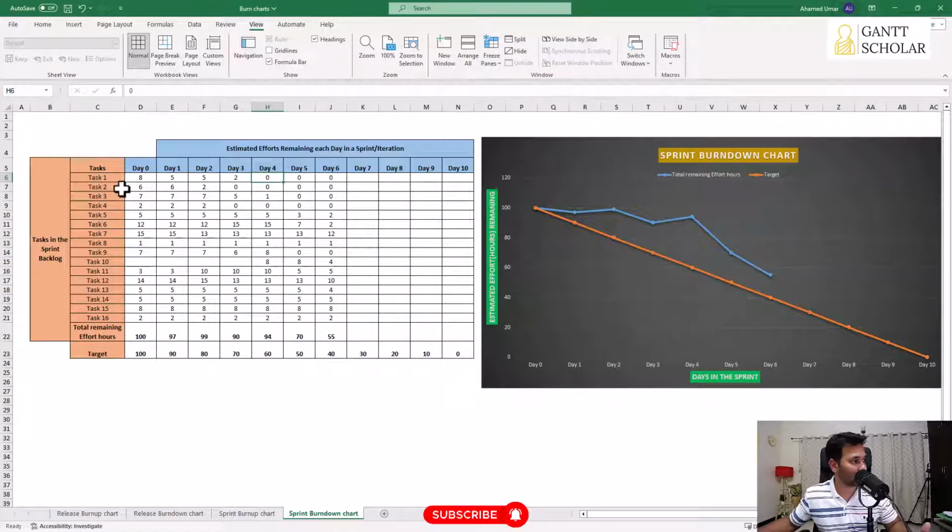So like this, we created the number sequence for all the other tasks inside the sprint backlog, which need to be done in this sprint, and we added up the total value on each day, and we have them here. Now you're going to plot these numbers as a blue line to indicate the actual performance of the project, that is actual work so far accomplished.